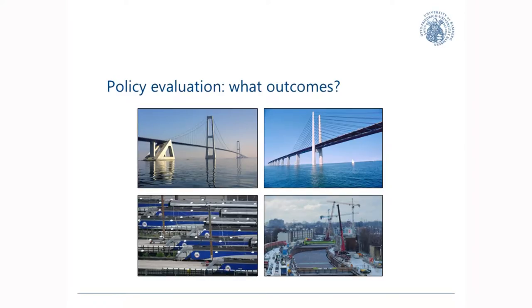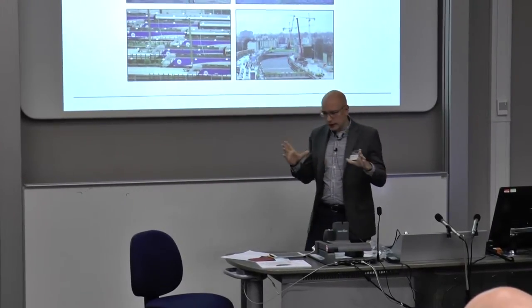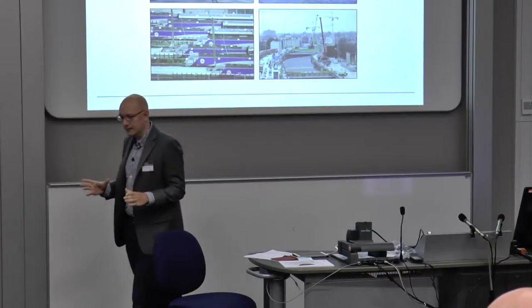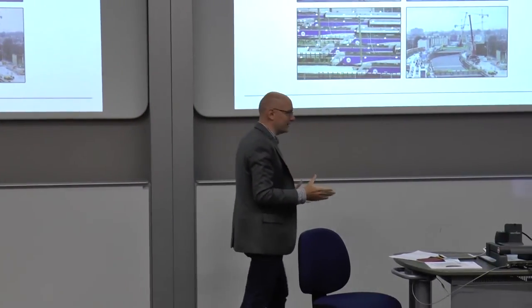What you see here: the Great Belt Link, the Øresund bridge, the Euro Tunnel — and I put up a fourth picture simply because I wanted four pictures. Flyvbjerg says these are similar projects: infrastructure projects that aim to connect certain parts in a somewhat innovative way. The Great Belt Link and Øresund bridge are innovative in that no one ever built bridges on that scale. The Euro Tunnel is innovative because no one had ever drilled a tunnel underneath such weak ground conditions beneath the sea. These projects were delivered years too late and were twice as expensive as originally planned.